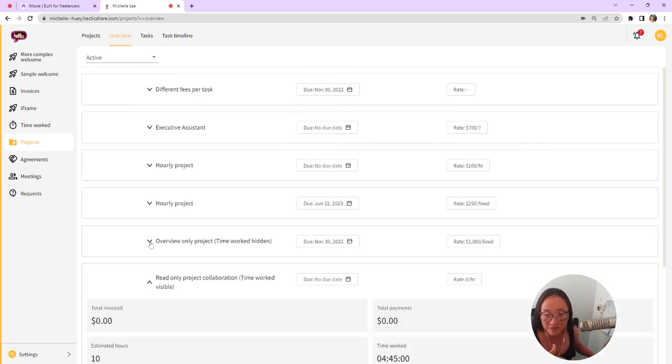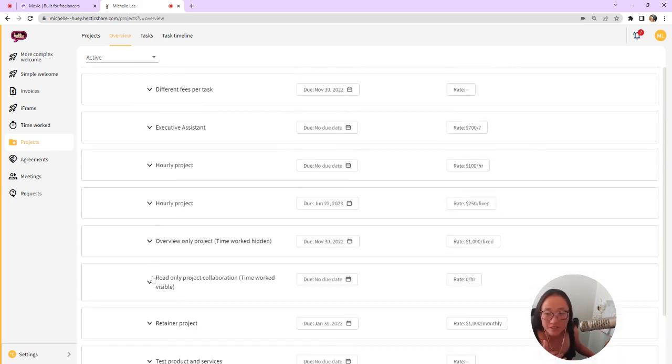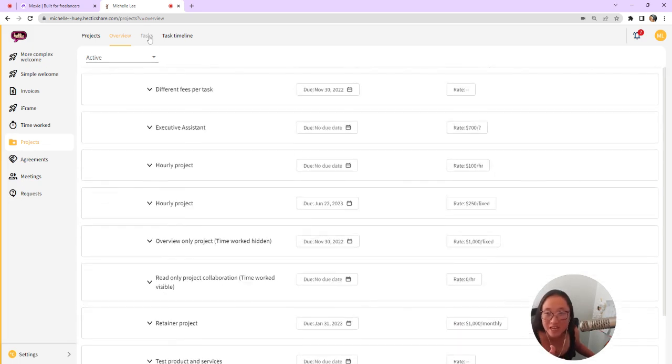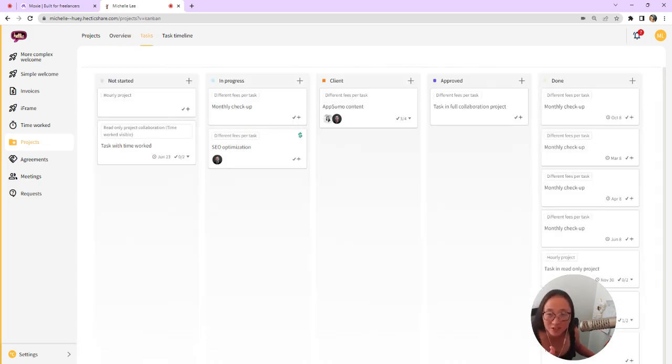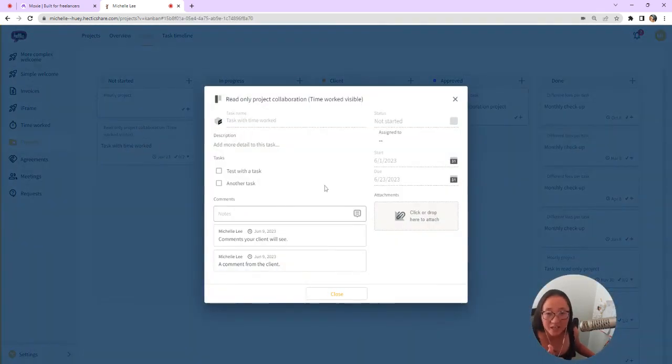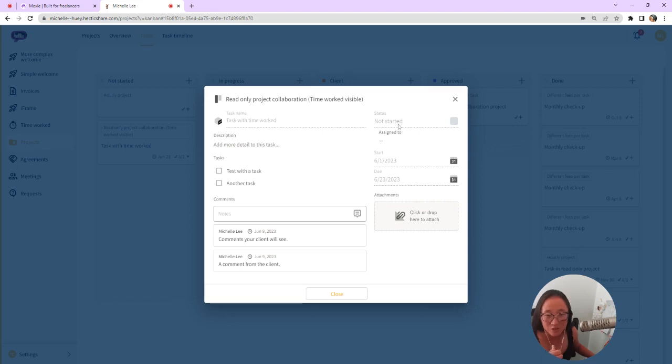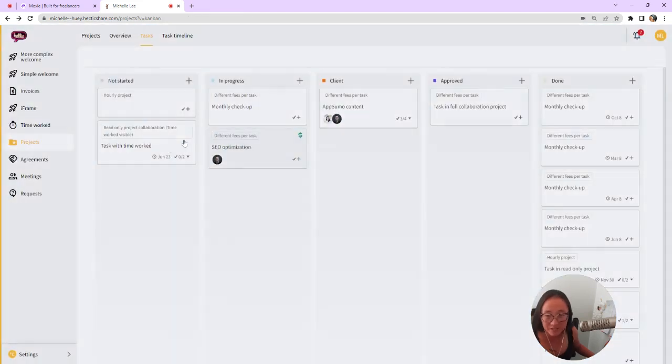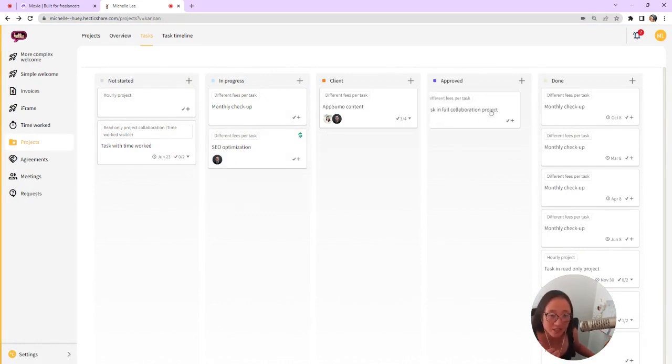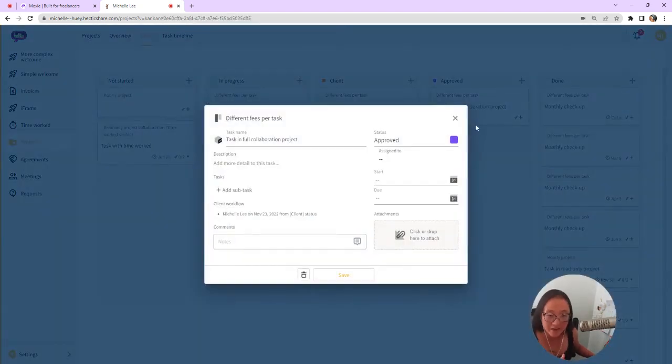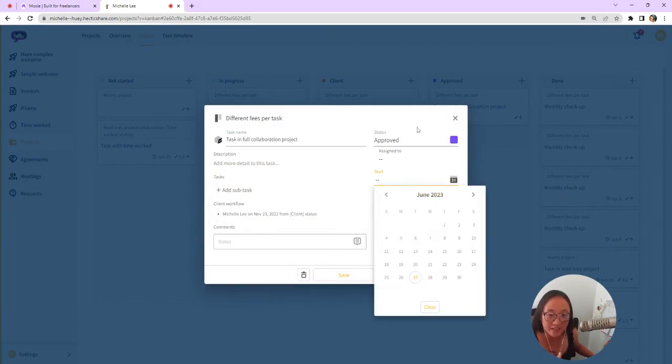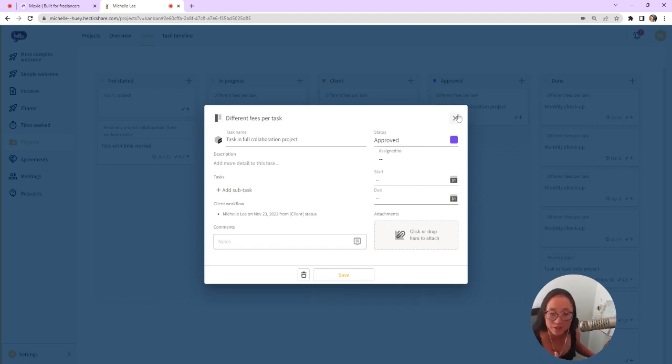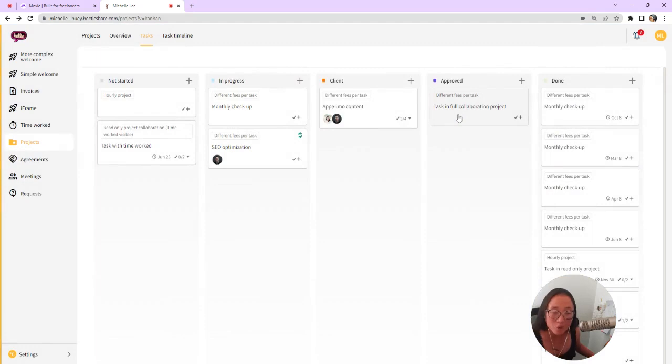I can also offer for them to do a complete collaboration with me on a project. You can see that here under tasks. So in these projects, I can allow them to take a look. This is a read-only, so they can make some comments, but they can't change any of the due dates or move it anywhere that they want to. However, if I did offer them full collaboration, now they can click and drag this project around. They get basically the same access to this as you have. So they can edit a start date, they can edit the due date, they can change the status, they can add details and tasks and subtasks. So depending on how much collaboration you want to do with your client, you'll set that up within your account under each project.